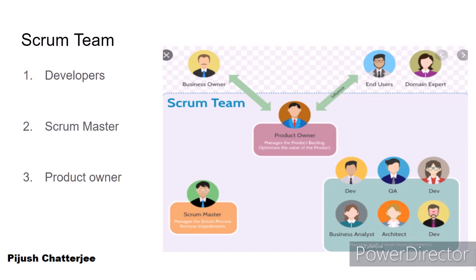The product owner is one single person for the entire product. A Scrum team can be broken down based on the complexity of the product. If the product is too much work, it can be divided into multiple Scrum teams, but all these teams are under one product owner. And when I say under the product owner, Scrum does not define any hierarchy, nobody below or under anyone as in traditional project management or reporting structures. The product owner owns the product, the Scrum Master owns the Scrum process, and the developers own the work that they are doing.